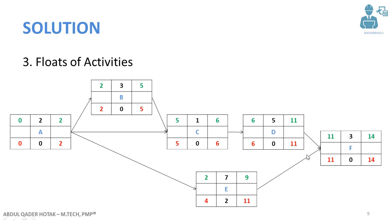Now let's calculate the float of each activity. The formula is: float equals late finish minus early finish, or late start minus early start. For activities A, B, C, D, and F, the float is 0. Only for activity E does the late finish minus early finish equal 2, so its float is 2. This means you can delay activity E by two days without delaying the project or its successor activity, which is activity F.